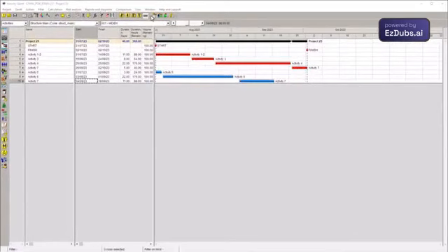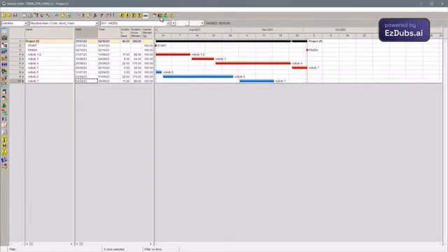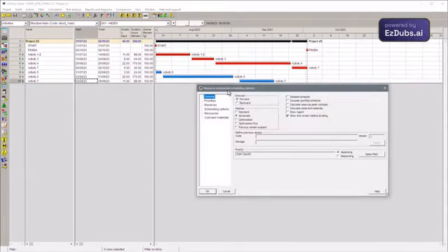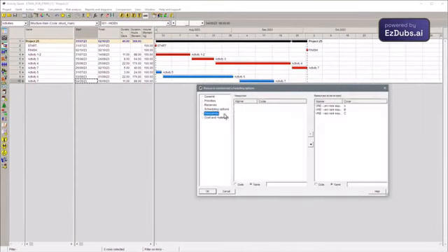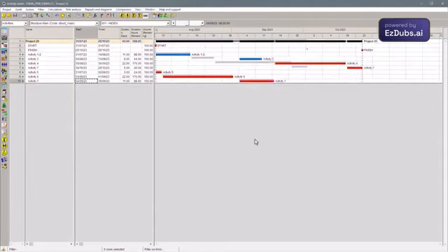Understanding now the limited resources, we will no longer calculate through simple shadowing options, simple scheduling options. We are now having resource issues. Let's abandon it and we'll ask it to schedule in a way that takes into account the restriction of rare resources. I'm going to show you that the rare resources are these over here. And it goes within a sequence, within an algorithm that I'm going to use the advanced one here. It searches for the solution. And the solution is this.